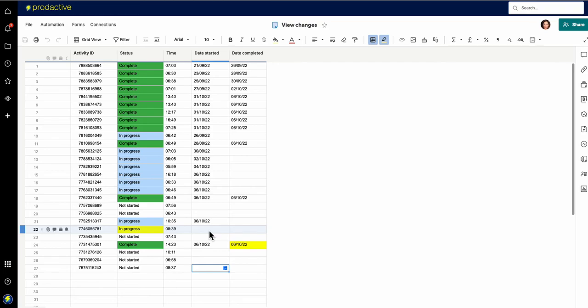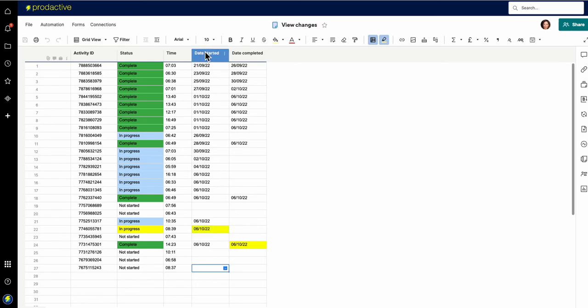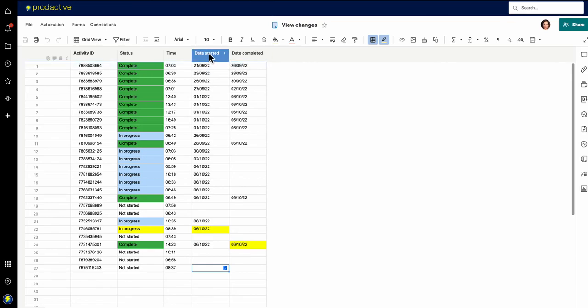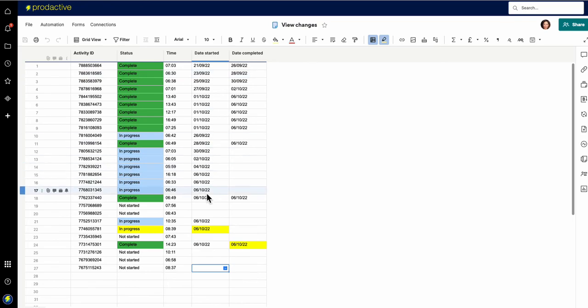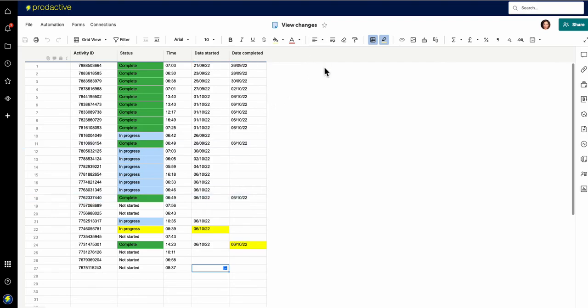If you've got a process workflow and you want to understand what the length of time it takes for each step in the process to happen, you can set up multiple columns to say, well when did it start? When was it completed? When did it move to the next step and the next step? So what you've got, it doesn't timestamp, but what you do have is a day piece here. So if you've got a process which goes through various steps, you can see the time it took between step 1 and step 2, or between step 2 and step 5 if you've got multiple columns here.